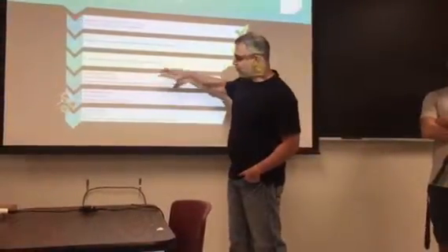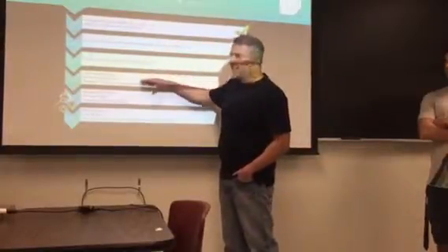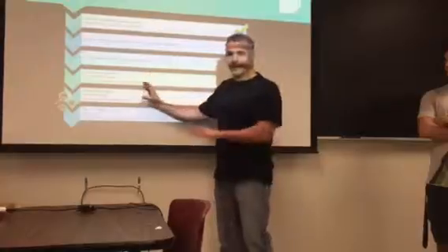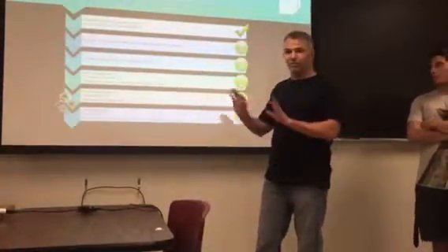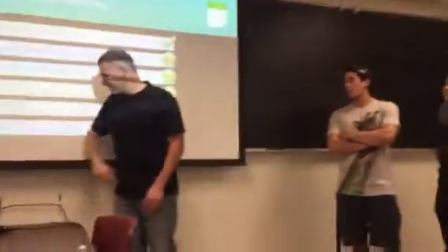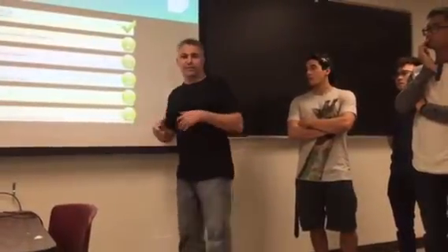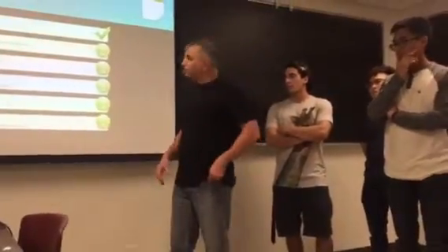Then we have a process where we'll enter an alpha stage. They'll look at it. We'll make any major last minute changes here. We'll get to a beta feature freeze stage where now we just do a little bit of tweaking, get all the bugs out, and then finally launch the site and go through the handover where the customer can use it, maintain it, update it, and keep everything going after we're out of the picture.